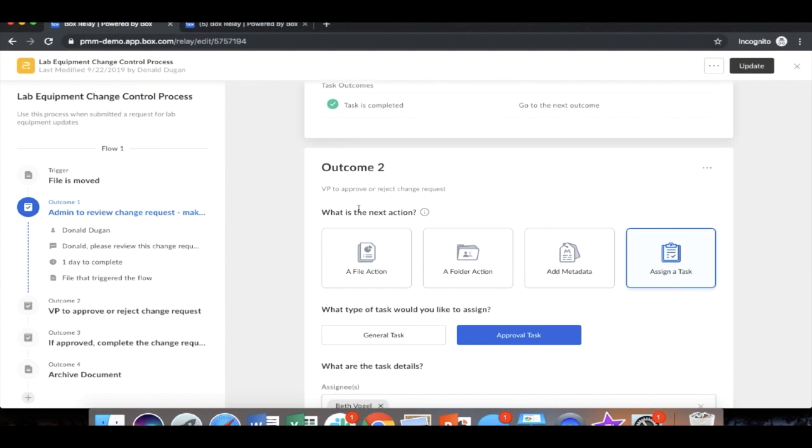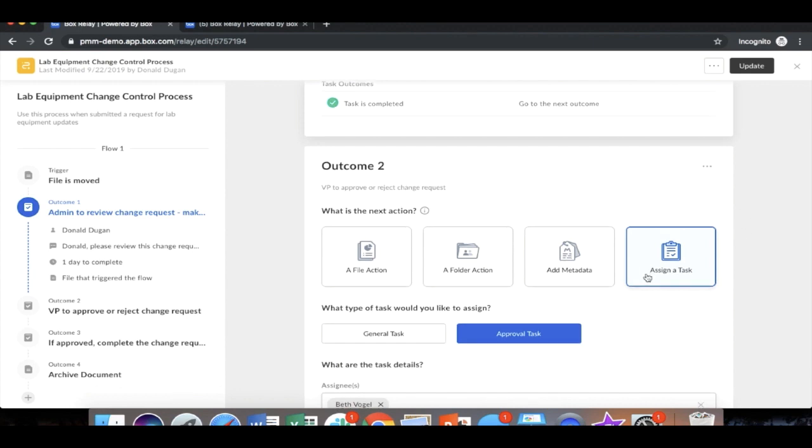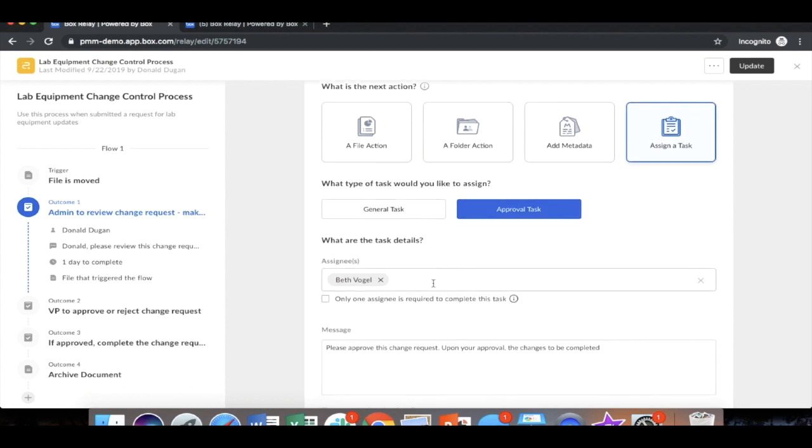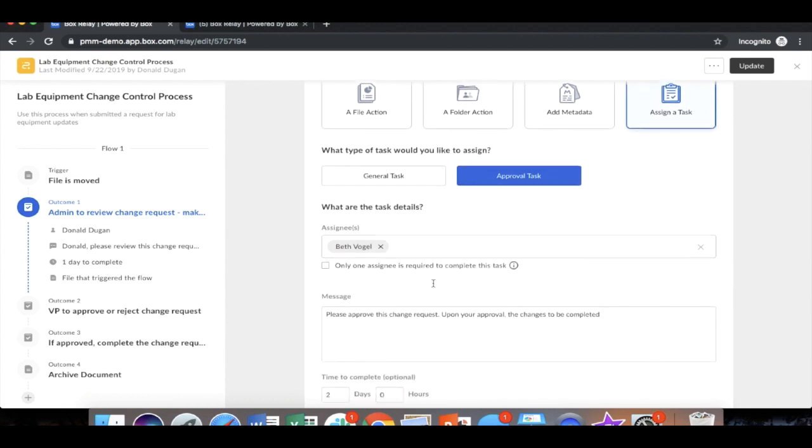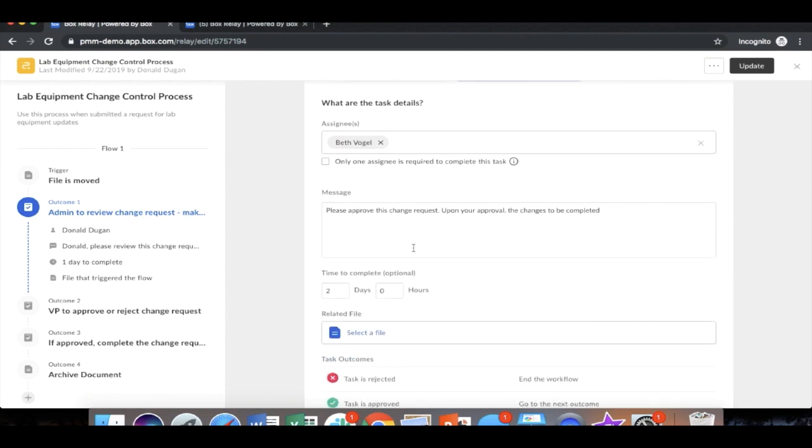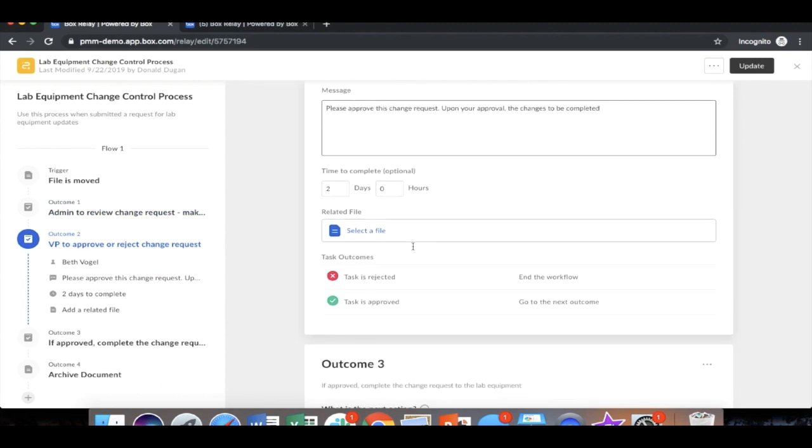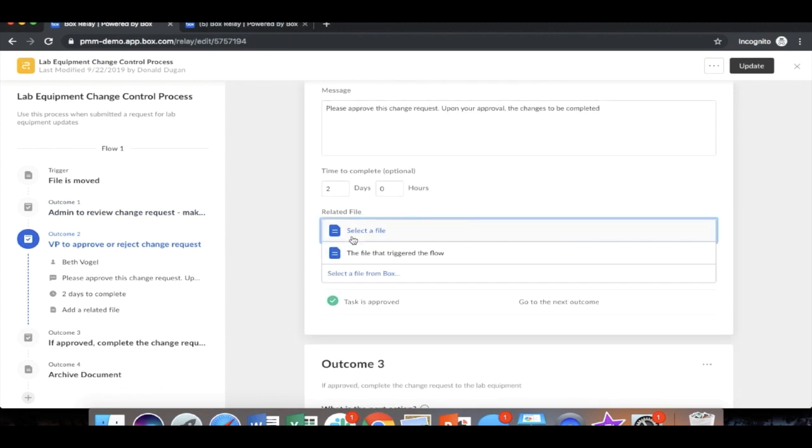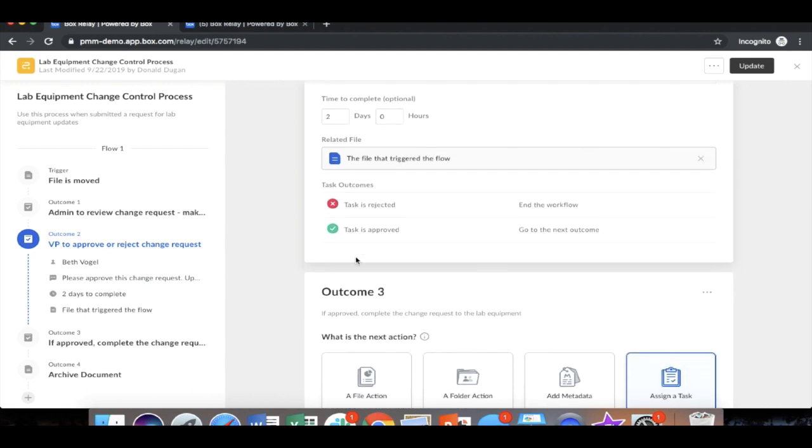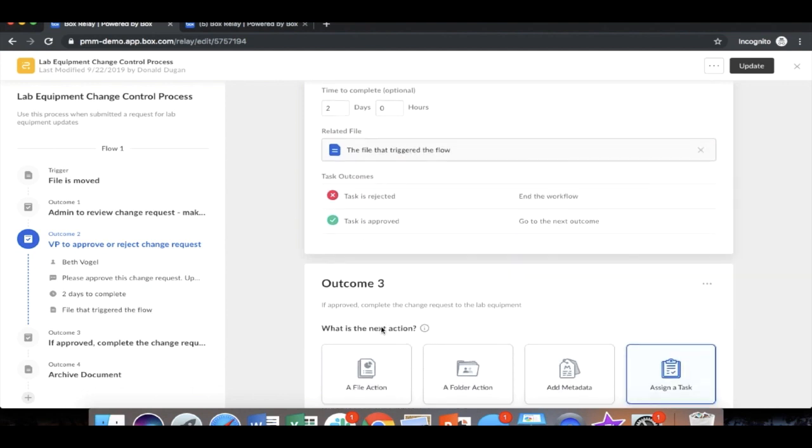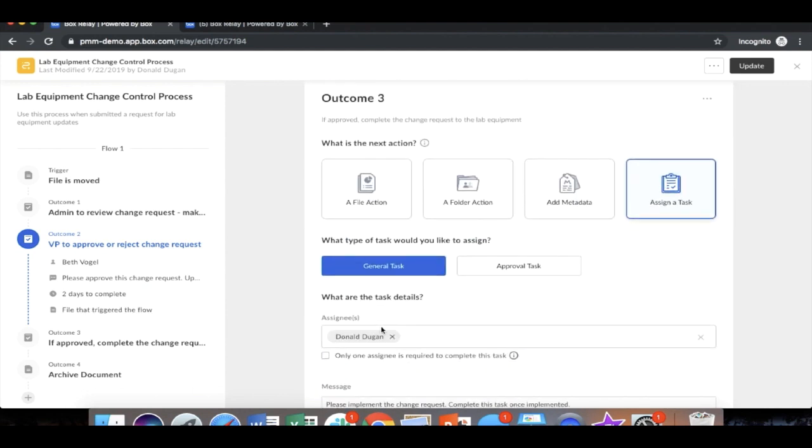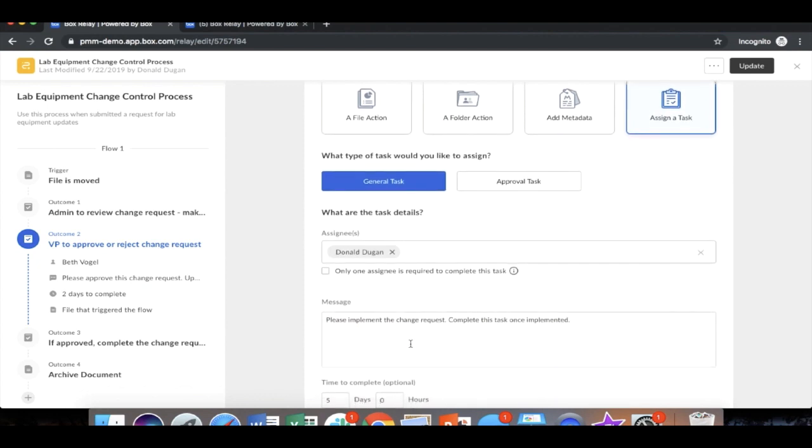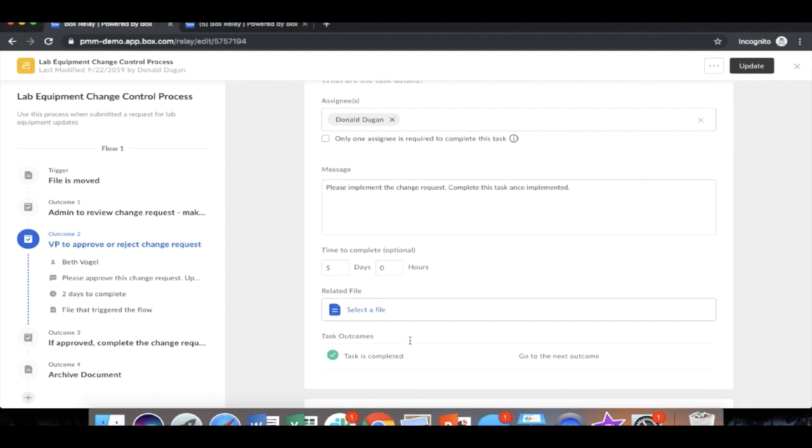Once he's completed the review, it then moves to the second step, which is the VP to approve or reject the change request. So here we can assign a task to Beth to approve this task with specific directions on what's asked of her. She's given two days to complete this task related to the file that triggered the flow. And if approved, we then move on to the third outcome, which is assigning a task back to Donald to implement that change request. He's given five days to make the changes on the equipment floor.